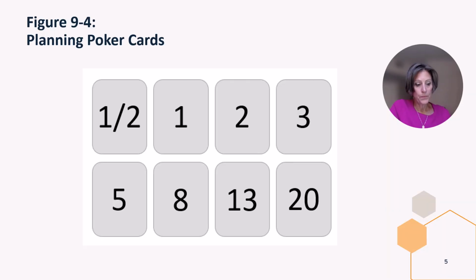Sprint scope. Depending on the length of a sprint, the Scrum team may spend 4 to 8 hours in a sprint planning meeting. The purpose of this ceremony is to determine which items on the prioritized product backlog can be completed during the next sprint. Factors such as the complexity of the deliverable and team member availability are factored into sprint planning. Planning poker is a common method of estimating the scale of tasks for a given sprint.